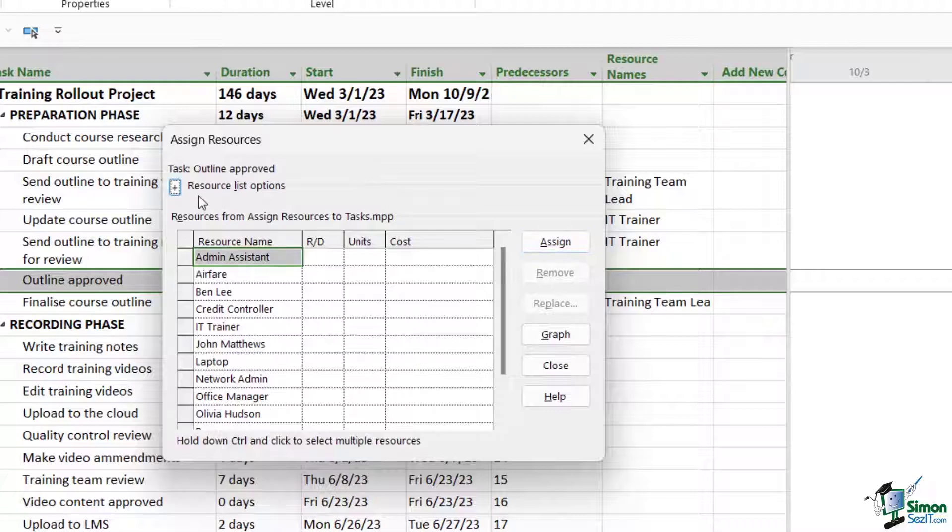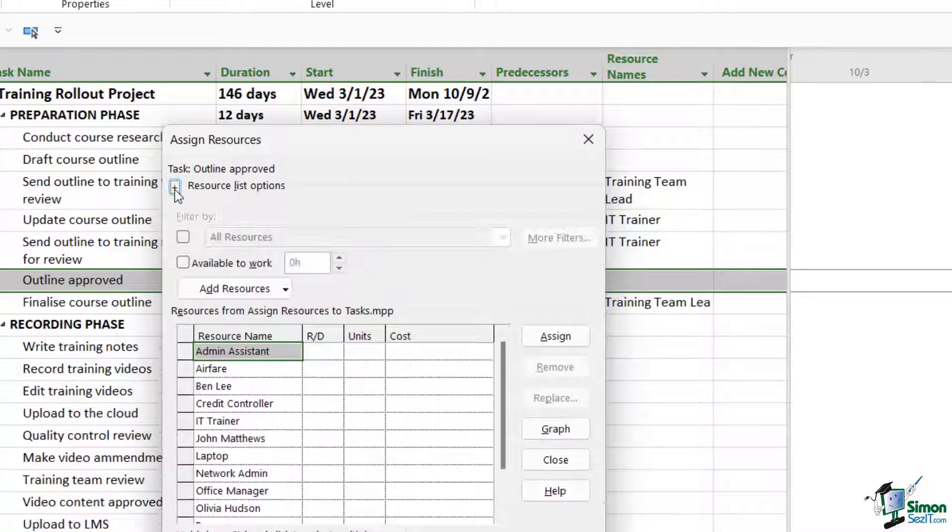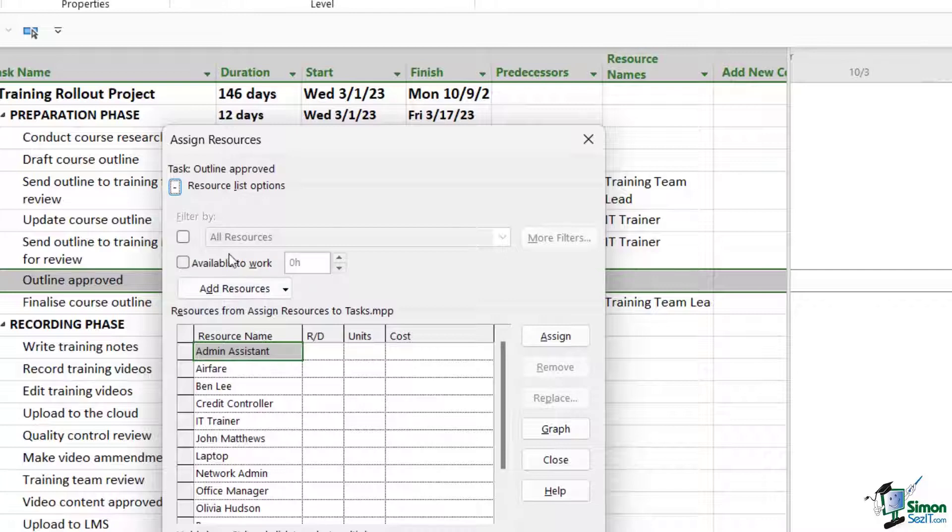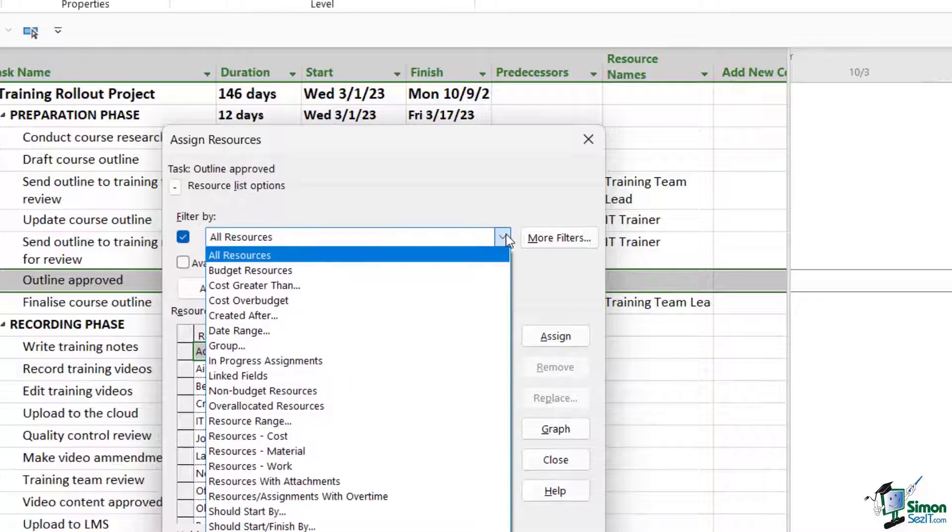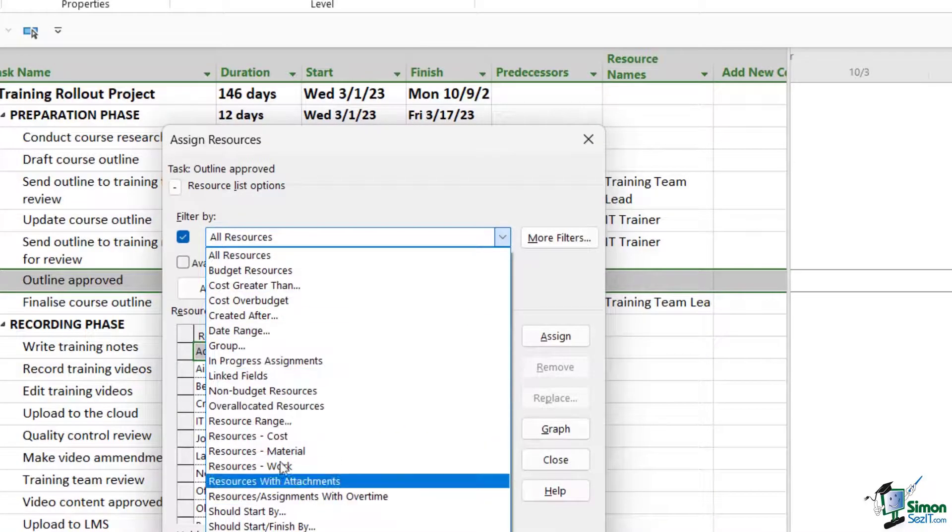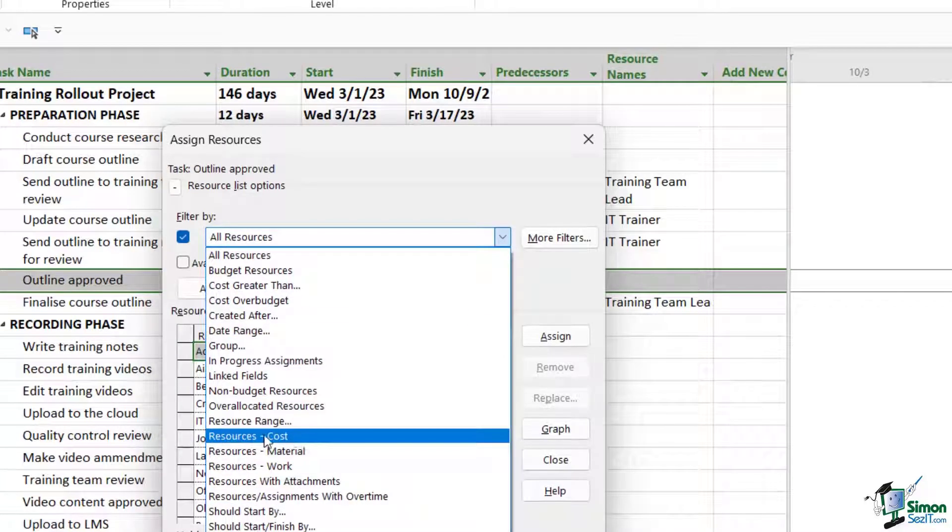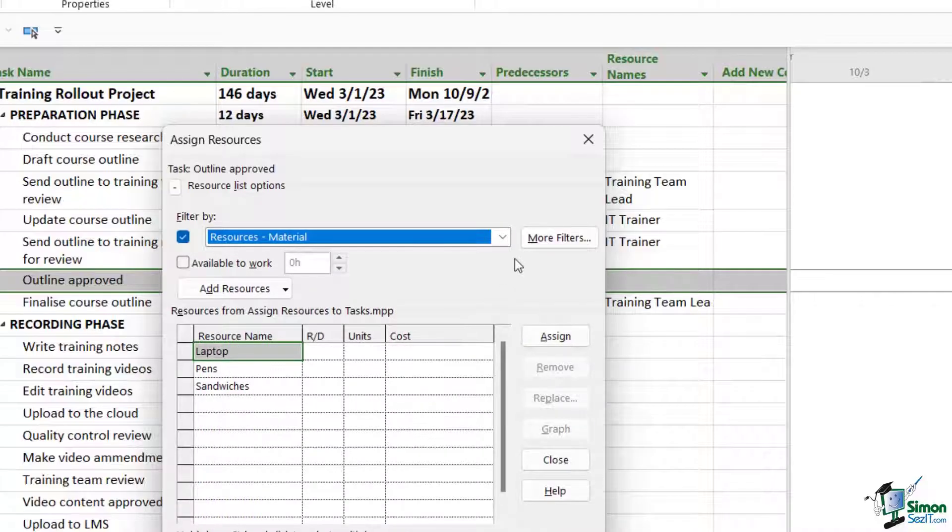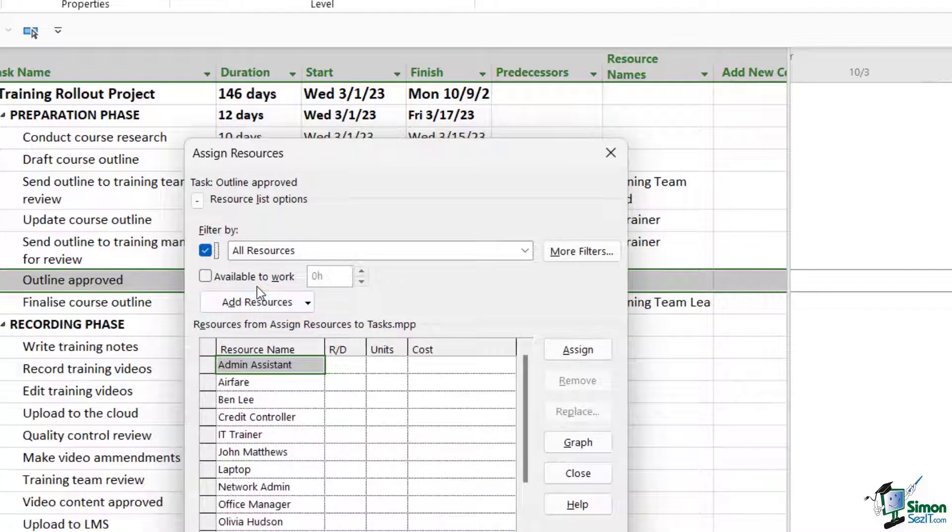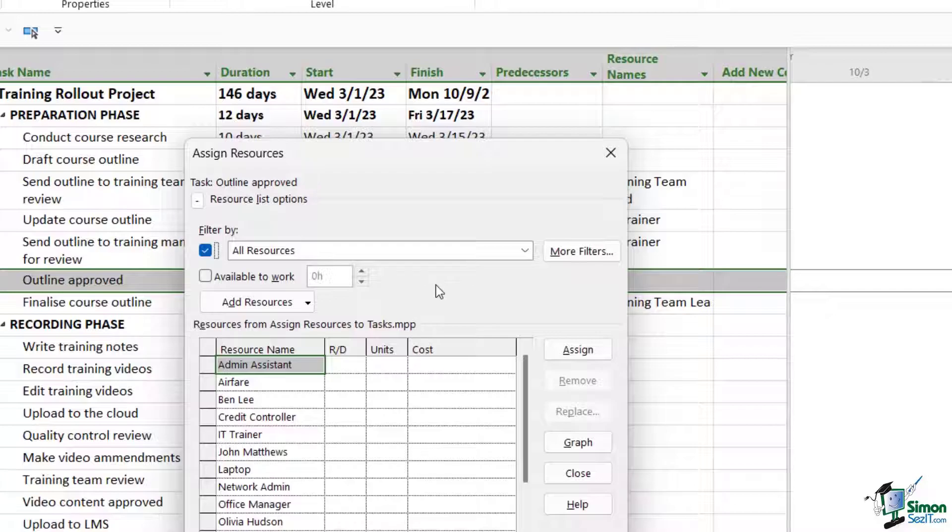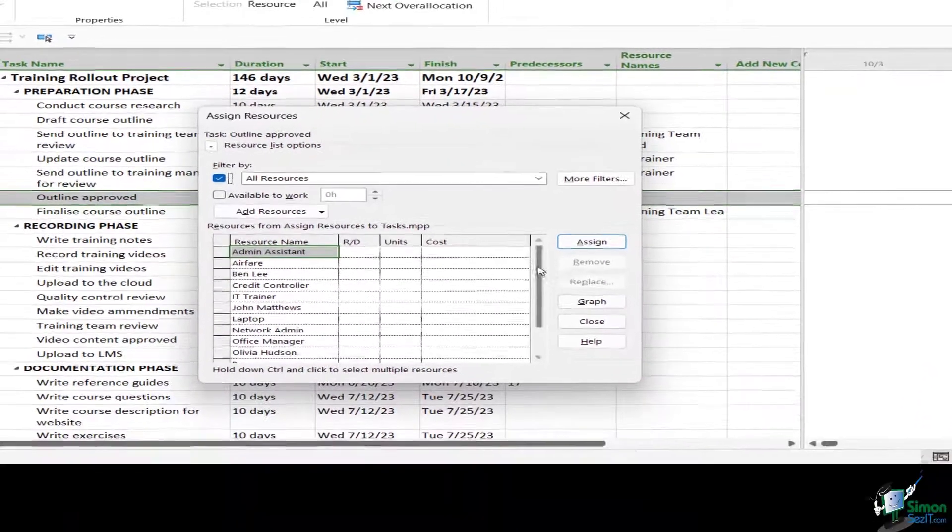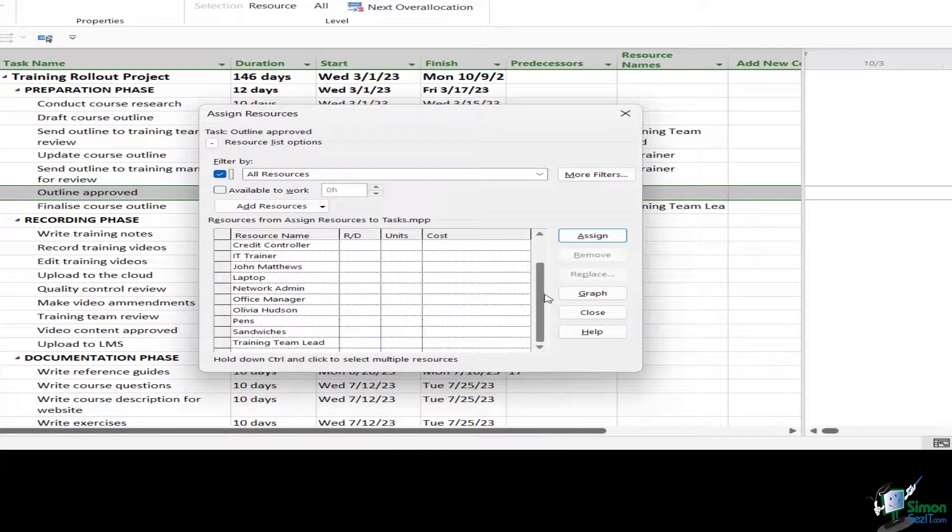Notice at the top here where we have resource list options. If we click the plus, this allows us to filter any of our resources below. So I could choose to filter by all resources or specific resource categories, like maybe I just want to see all of the material resources. If I select that from the drop-down, I'm just going to see those. It's worth noting that we can also filter by resources and the amount of hours that they're available to work.